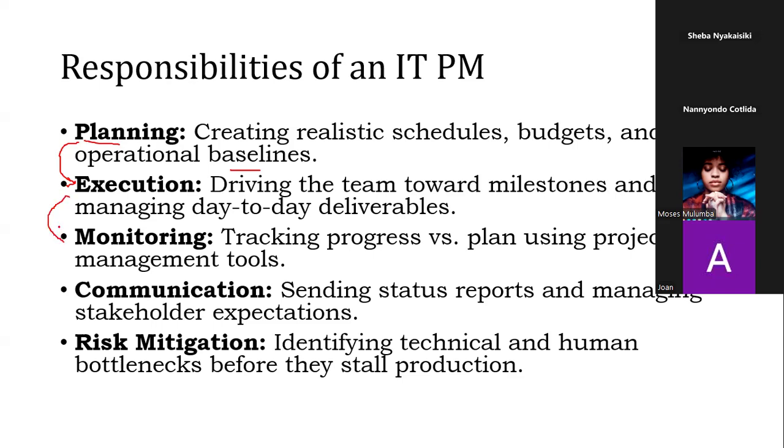So during execution and after, you carry out what is called monitoring. Monitoring is to make sure that you're hitting the milestones, but not just hitting the milestones, but you're moving towards achieving the objectives. If it was a new customer relations management system, you find out along the way, technically, are all the features working, are all the features acceptable to the user, both one end and the other end, are they giving us the necessary results, and so on and so forth.